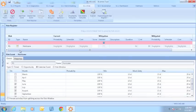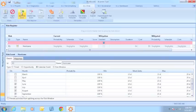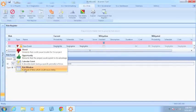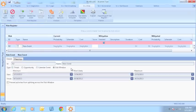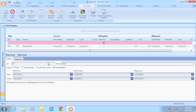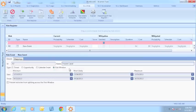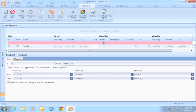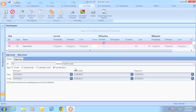We can also add a risk window. This could be something like if I had a frozen canal that may happen and may impact my schedule, but I'm not quite sure when the canal is going to freeze. It could be as early as December or it could be as late as February. I can go in and define the minimum, most likely, and maximum time periods for that risk event and then map that risk event to the areas of schedule where it might impact.